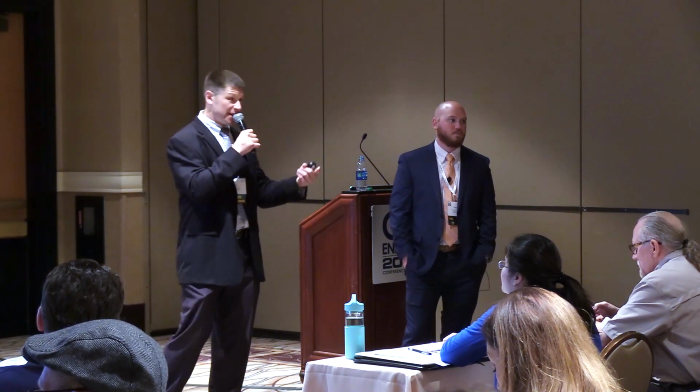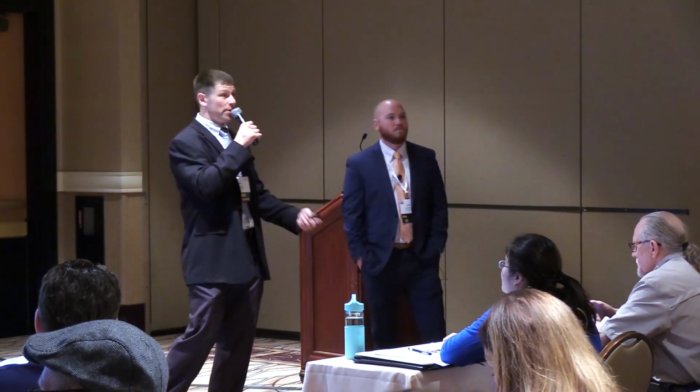And that's great. What we typically do is we'll tag them with, is this something that your O&M staff should be able to just go in and fix? Is this something that's big and it's going to take a contractor to come in and fix? Is this something that we can fix on the fly? Sure is, and we did. We keep those items all running on that log so they can see what's going on. But this is your bang for the buck. This is really what they're getting out of these projects.